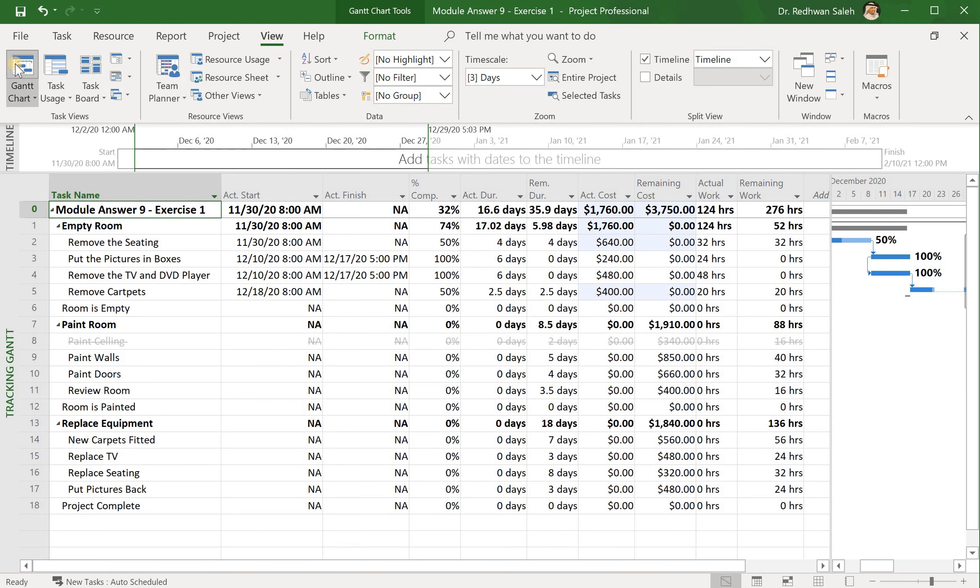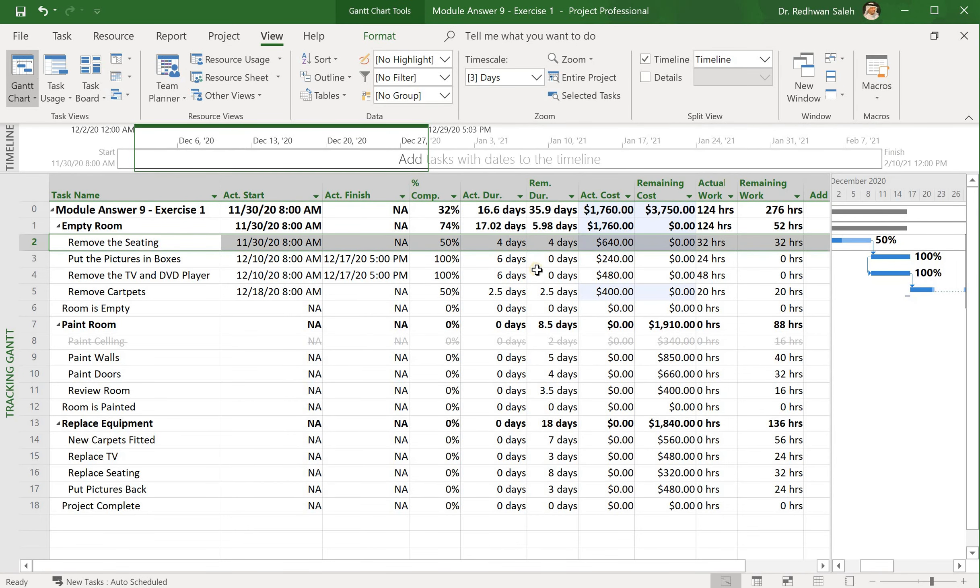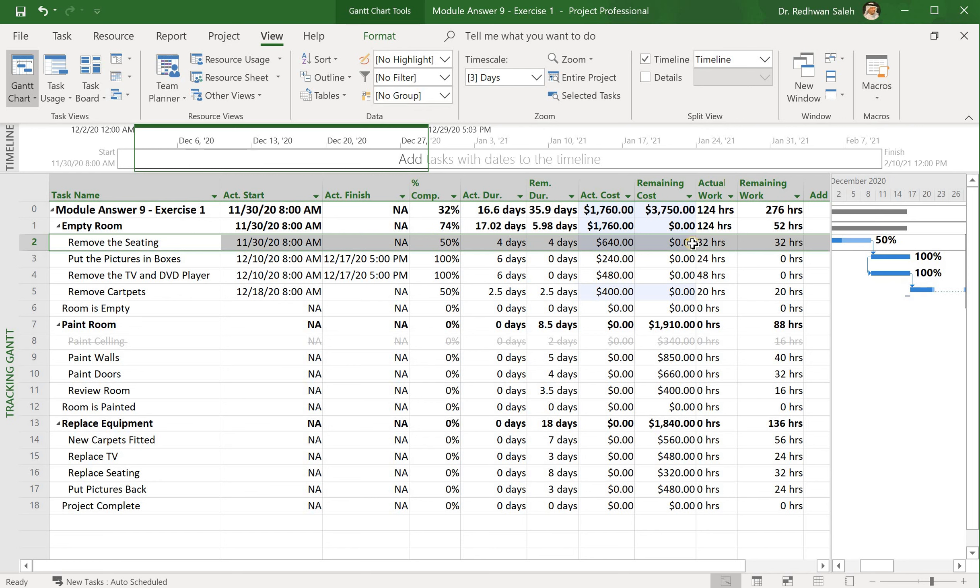To the Gantt chart, I can see that assignment number two, I have the full amount paid after 50% is finished, because 50% will be paid in advance and 50% when 50% of the product is finished. And if I wanted to be accrued to the end of the task...